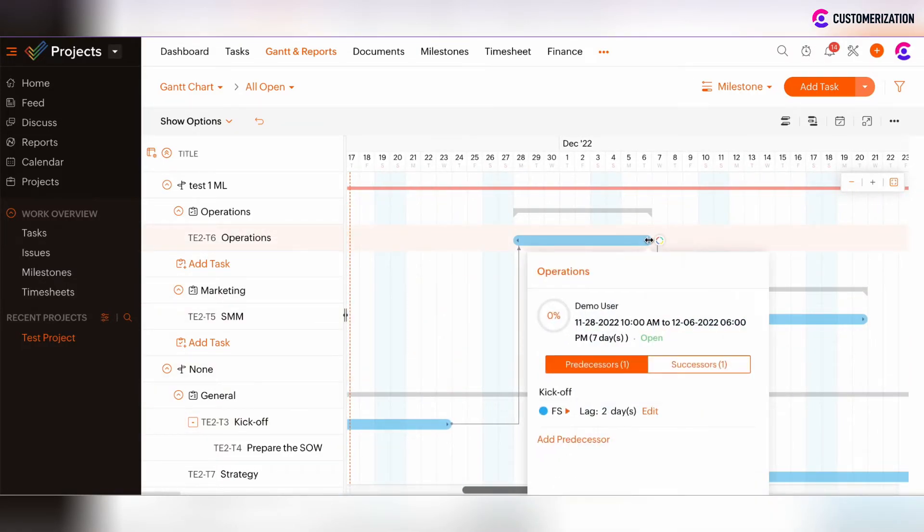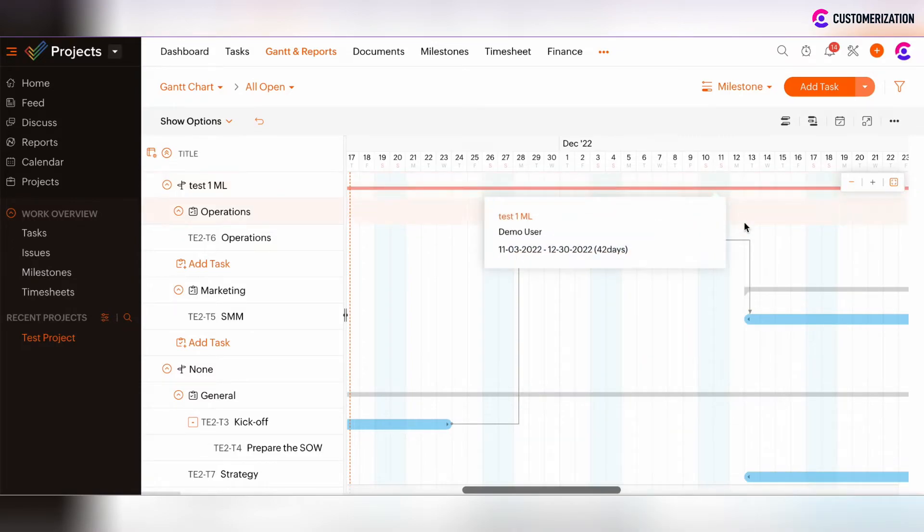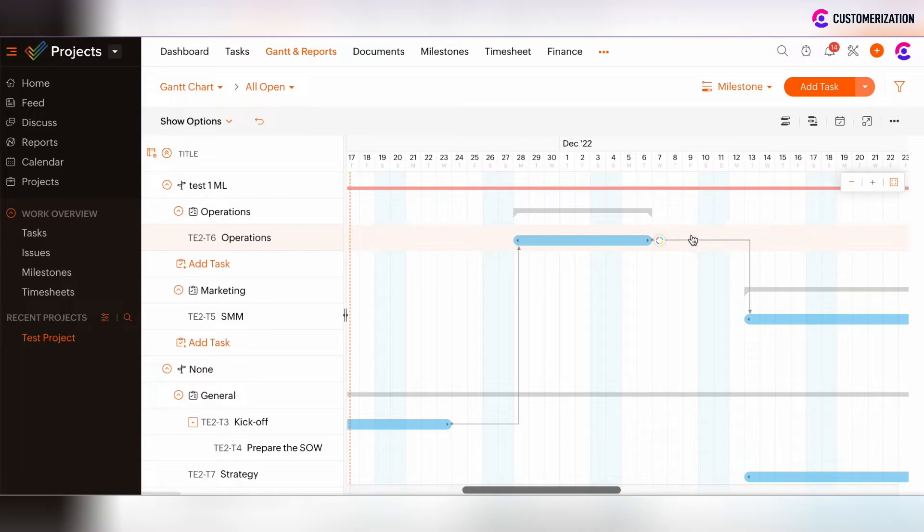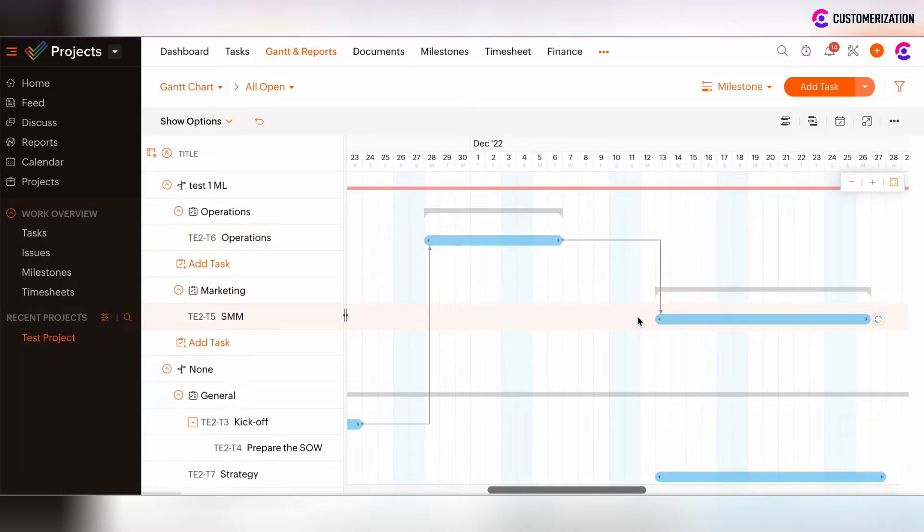Same thing with the successor time lag. For example, we can add four days. And now such four days time lag was added after operations task and before SMM task.